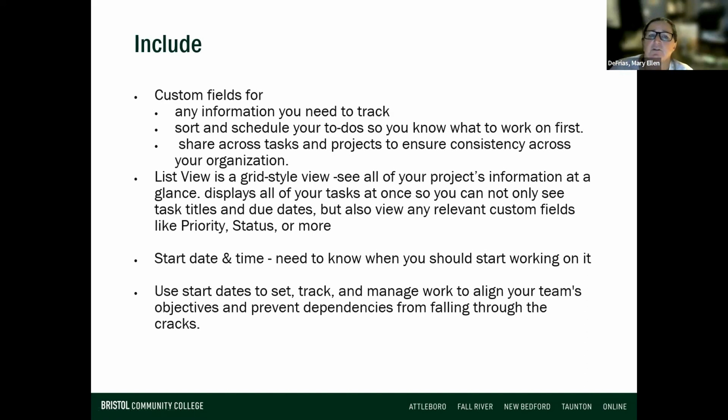If there's any information that you need to track, make sure you have a way to track that, right? So if you've got 3 employees working on a project, where are you tracking their time, right? Because the payroll system is only going to track how many hours they work in a day, but it may not track what project they're on, depending on how you have it set up. So this is where you want to track, when are they actually working on this project?